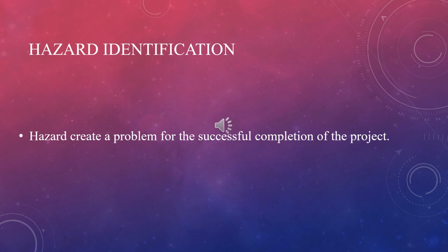In identifying and analyzing hazards, we can usefully distinguish between the cause, its immediate effect, that is the problem that it creates, and the risk that will pose to the project. For example, the illness of a team member is a hazard that might result in the problem of late delivery of a component.